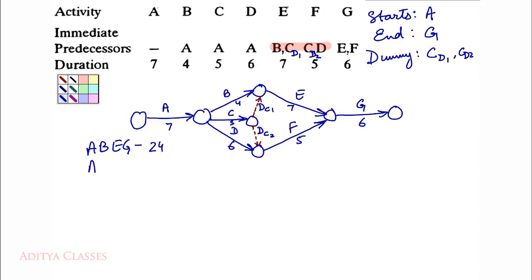Path A, C, E, G has duration: 7, 5 — giving 12, and 0 for the dummy — giving 12, and 7 — giving 19, and 6 — giving 25.